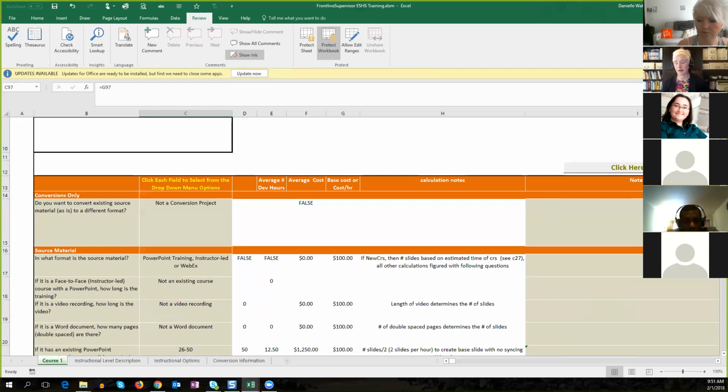It's kind of like the 508 stuff. You're going to have projects where new requirements creep up, and you add a line item and ask, how long is it going to take me? I'm doing a project for the federal government right now, and I hadn't used the new closed captioning in Storyline yet. So I literally tracked every minute it took me to set up the closed captioning and sync it, and I had to do some work with SRT to get the narration out of a video on YouTube. I have 5 modules for them, so on every one I'll do the same thing, and that will give me a really good estimate for my next project.